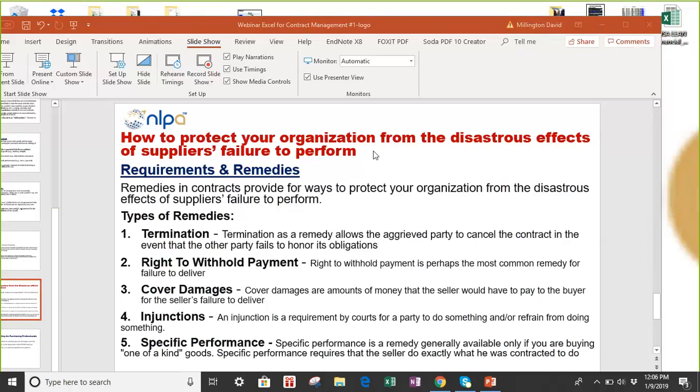And then, do you have robust mechanisms that could detect if, under certain circumstances or conditions, a supplier may fall out of compliance, on a scale of 1 to 10? It's very important that we understand these 3 parameters: occurrence, severity, the degree of impact, and your capability to detect. This way you could take preemptive action and deploy the necessary contingency plans to mitigate those risks.